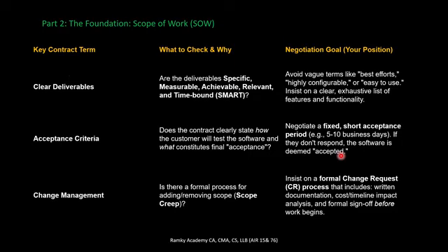For example, you have delivered the work. If the customer is not replying within 1 week or 2 weeks, then it should be considered deemed acceptance. So in this case, we are fixing it for the customer: we delivered the work, and if you are not replying to us within a week or 2 weeks, we will consider it a deemed acceptance, and we will go ahead since you already accepted.